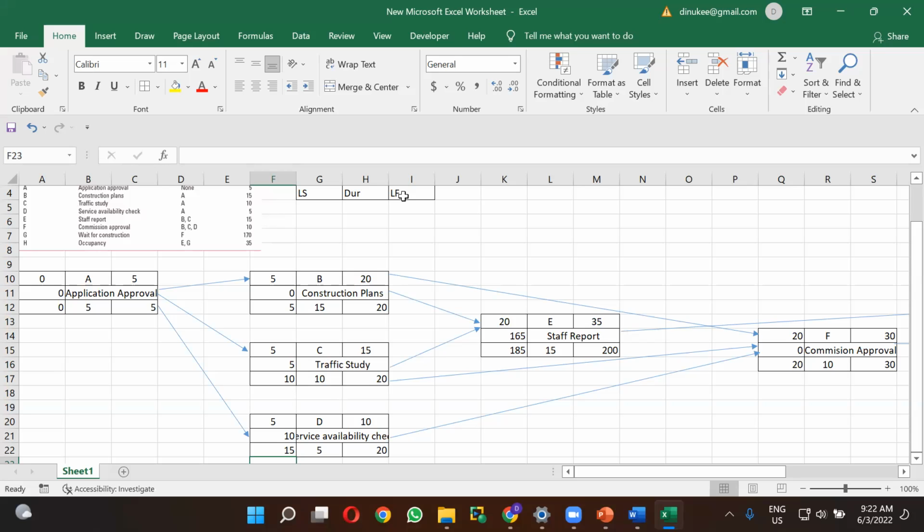There is another way you can calculate the critical path. That is the second approach. You can take the zero slack nodes and connect all of them. After connecting all the zero slack nodes, you can easily identify the critical path. So those are the two approaches that you can use when determining the critical path. So shall we do the first approach?